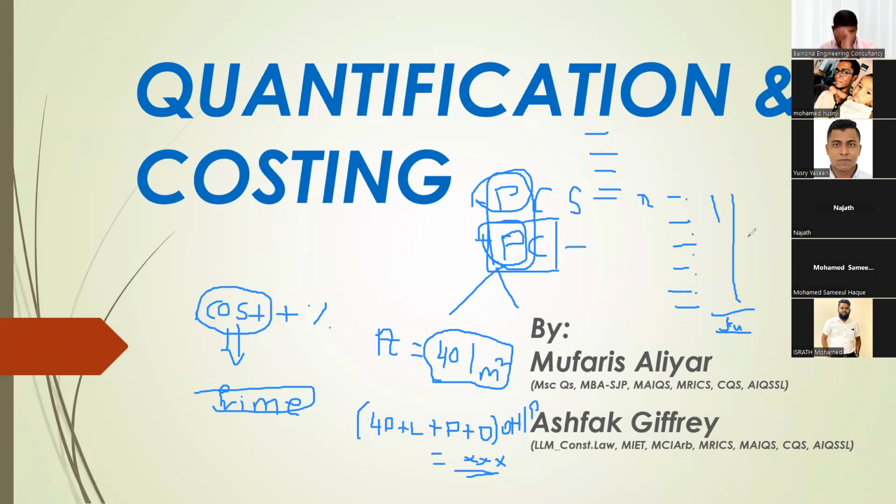Okay. So if a client confirms the tile, only then can he get the data sheet. So what's happening? He didn't confirm it. So what does he do? He goes back and tells the client, see, you didn't finalize it. I want to put it as a PC rate in the contract, because now you don't have time. You need to float the tender. So that they put it as a PC rate, because they are informing the contractor, our price for this